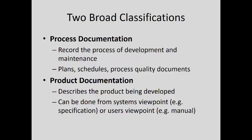There are two broad classifications. Process documentation records the process of development and maintenance — plans, schedules, process quality documents. Product documentation describes the product being developed, from a systems viewpoint such as a specification, or from a user viewpoint such as a user manual or quick reference guide. Agile methods are very much against process documentation, and I have sympathy for this view, but sometimes it's really necessary. As an agile team you need to be co-located, have the client on site, and have explicit trust with the client. If you don't have all these things, you're going to need some form of process documentation to back yourself up in case of a disagreement.